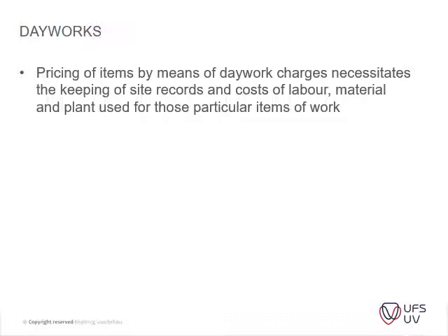And now you have an addition to the project, and now you can refer back to that labor rates and say, okay, this item will take me 2 days longer. It will include this artisan and this laborer to do this work. It will take him 2 days. This is the rate per hour, and then you can calculate what the total cost for that item would be.